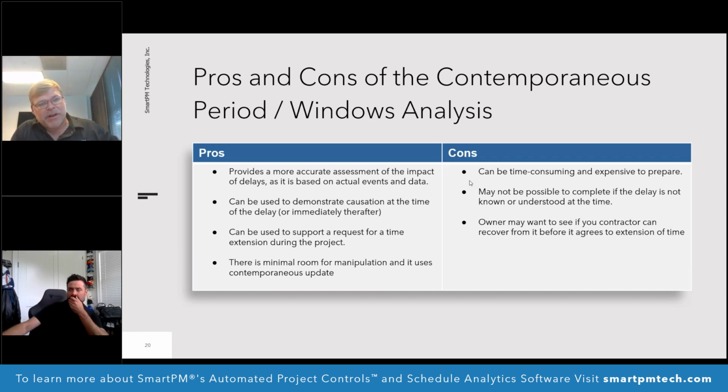This can be done during a project, and this should be done during a project. And there's less room for manipulation. Now, that's not 100% true. Sometimes people use the contemporaneous update to spin a story, but that's where I'm saying if you get caught doing that, you're sort of screwed, because that's then going to be the last time the owner trusts you going forward. So I wouldn't do that.